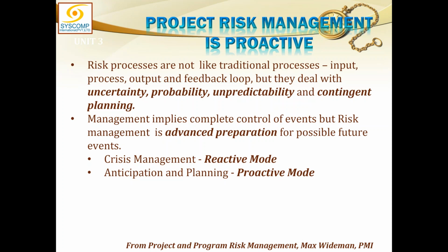But a risk is this can happen, that can happen. So whatever can happen, that has a probability attached with it. Some has a higher probability, some has a lower probability. So this is matter of uncertainty, probability, unpredictability. And naturally, for catering these unpredictability, we have to have some contingency allowance and some contingent planning has to go in there. That is why we keep reserves. So we keep some extra money, some extra time for dealing with such kind of uncertainties.